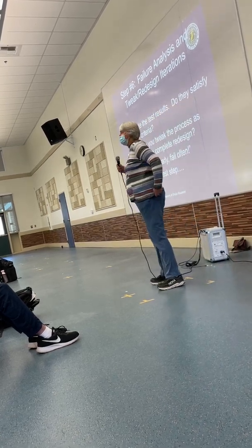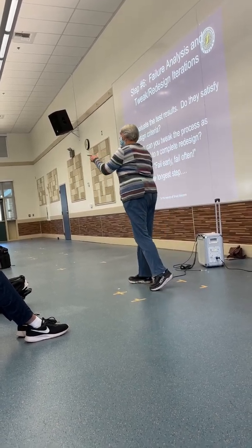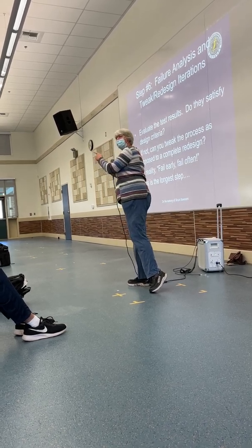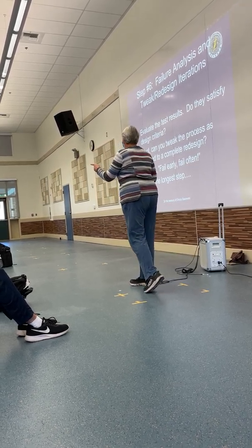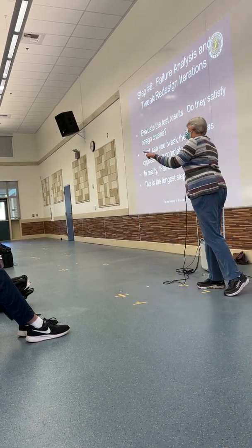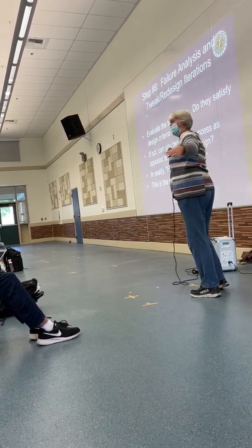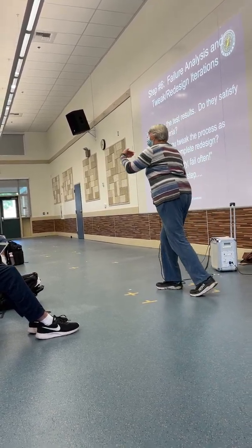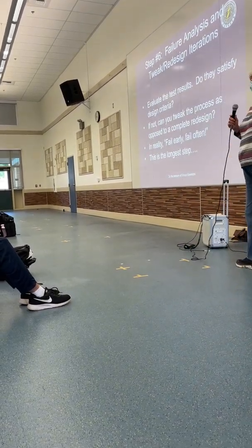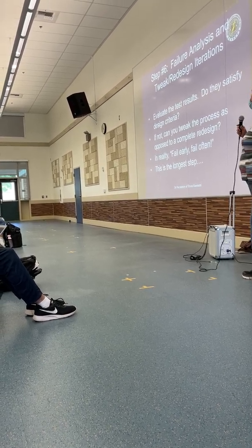It's really, really smart to fail quickly, because you don't want to get to the very end and then fail, because now you've got a complete redesign with no schedule left to get this done. So fail quick, do your early testing, and keep testing on successive items so that eventually you're going to get this thing tweaked up so that it's going to work. And this takes a while. Don't go to the last day before it's due and think you're going to start testing. Plan it out. Next.